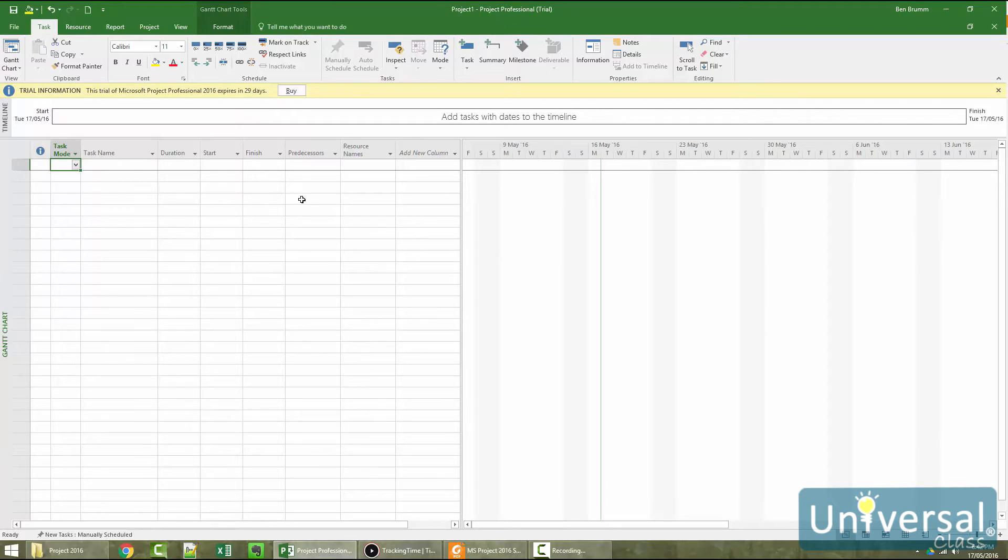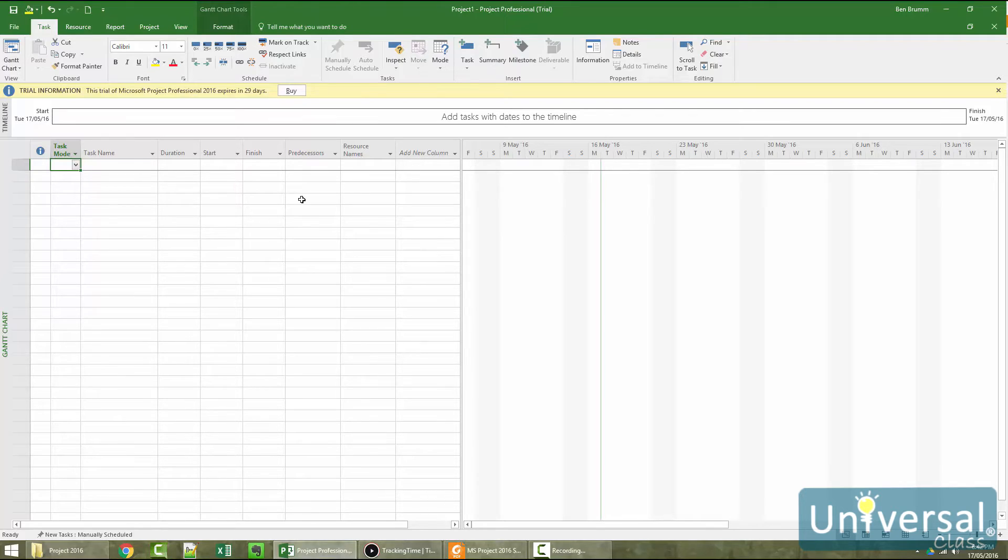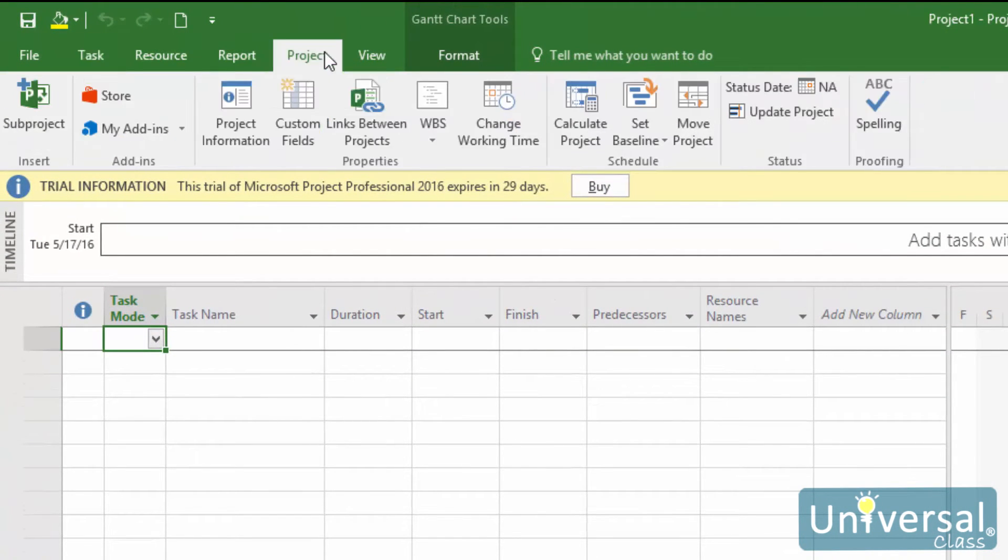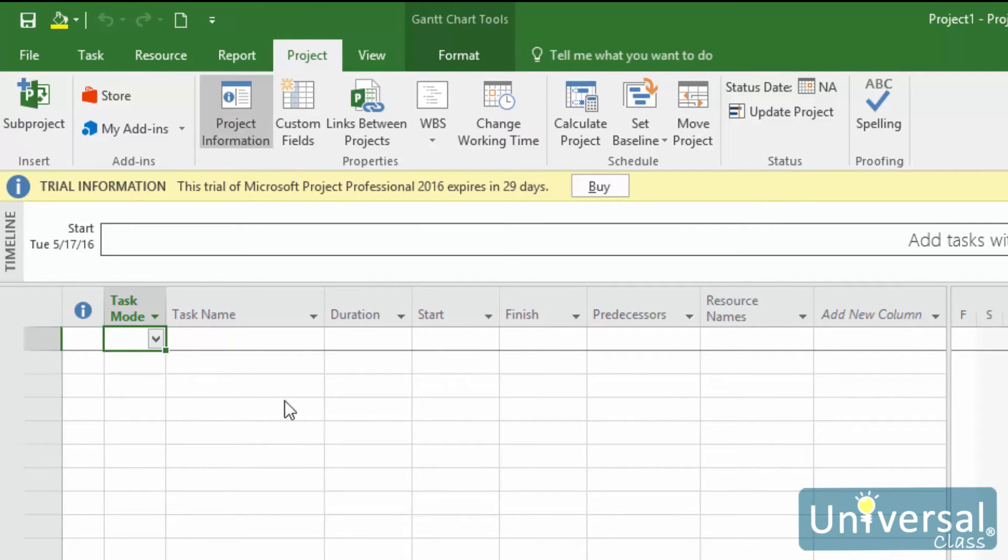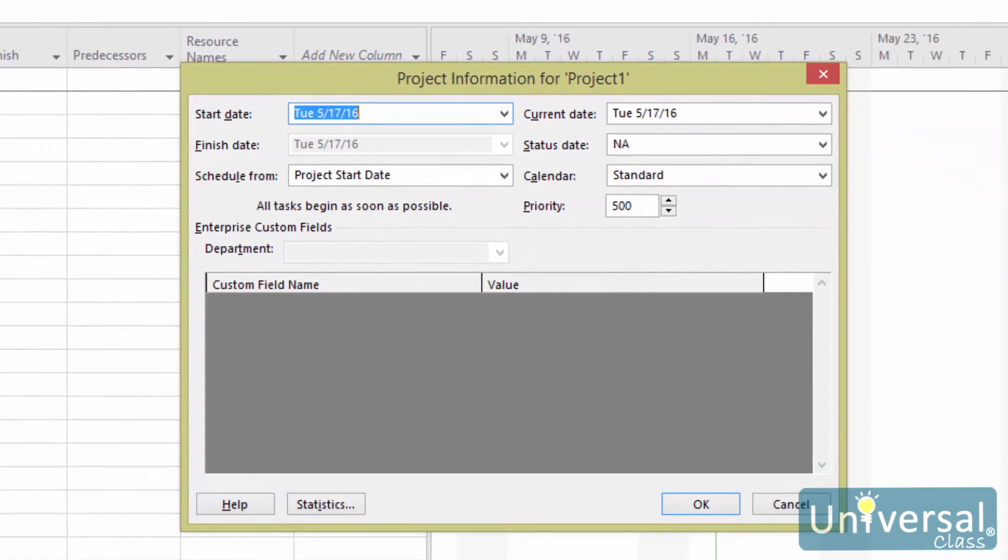Once you've defined your project, it's time to begin in Project 2016. The first step in creating a project in Project 2016 is selecting a template to use, as we discussed in the previous lesson. You can choose a pre-designed template or simply use a blank one. For this course, we will use a blank template. The next step after you've selected a template and created a new project is entering information about your project. This information includes start and end dates for your project. To enter this information, go to the Project tab, then click on the Project Information button in the Properties group. You'll then see this dialog box. Enter the information about your project.